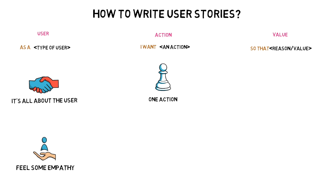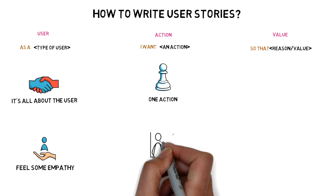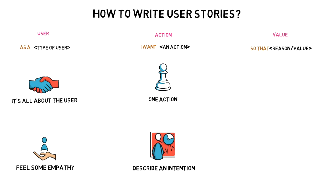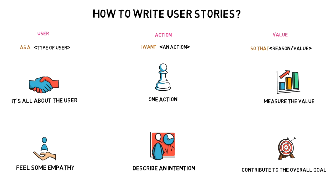One story: as a customer, I want to browse items. And another: as a customer, I want to add items to the cart. Also, describe an intention, not a feature. For example, instead of 'I want to manage my profile,' create a few stories like: I want to be able to register my profile; I want to be able to upload my profile photo; I want to link my credit card to my profile. Each user story will have a different value. Finally, the last piece is dedicated to the value — the benefit users will get after performing an action. Each story should contribute to the general goal of your product, and if you can't answer what value this user story brings to end users, then you're doing something wrong.